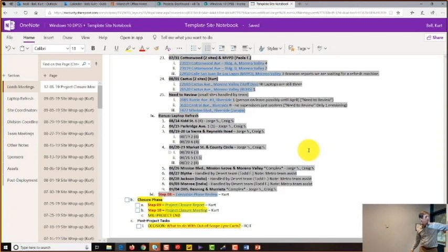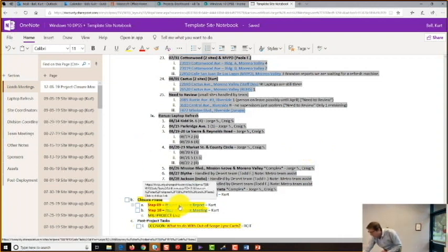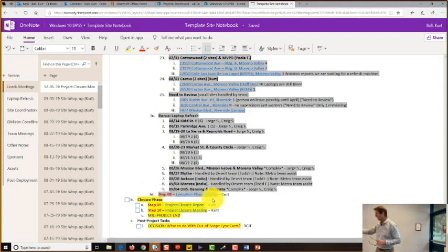And the first thing we're going to do, I want to point out that I can't make these gray until they're done. So under closure phase, these are red ones. They must be done. Step 9 is the project closure report. That's the document each of you has in front of you. So I've been working on that document, and hey, it looks like it's done. So guess what I get to do? Check it out. Yep. But not just check it off, and I'm executing this particular step not necessarily for your benefit, but for the benefit of project managers who want to use this process.